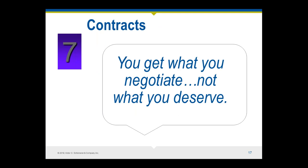And of course we get to contracts. I love the saying: you get what you negotiate, not what you deserve. You need to understand that if you negotiate an onerous contract with a client that makes you very nervous, don't assume those terms will not be upheld by the courts. The courts are basically going to say that if you couldn't negotiate changes, you had every right to say no and walk away from it. So once you sign that contract, you're going to be held to the terms of what's in there, good or bad.